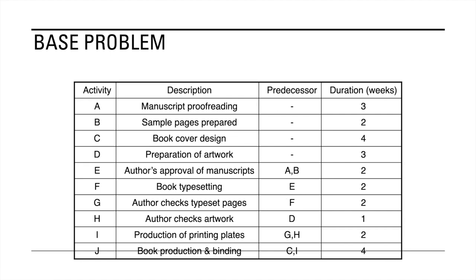Now, I think it is important to note that one of the biggest assumptions of Pert-Cpm is that you won't be able to finish the project if there is at least one activity that is not done. So the assumption here is you have to do all of the activities in order for us to say that the project is done. And therefore, we will be able to compute the complete and entire project duration.